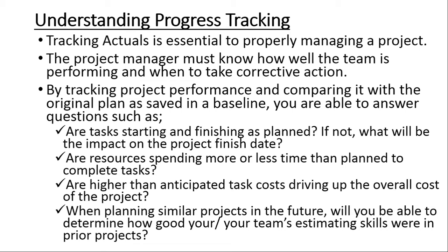By tracking project performance and comparing it with the original plan as saved in the baseline, you are able to answer questions such as, are tasks starting and finishing as planned? And if not, what will be the impact on the project finish date? We also want to see, are resources spending more or less time than planned to complete tasks?